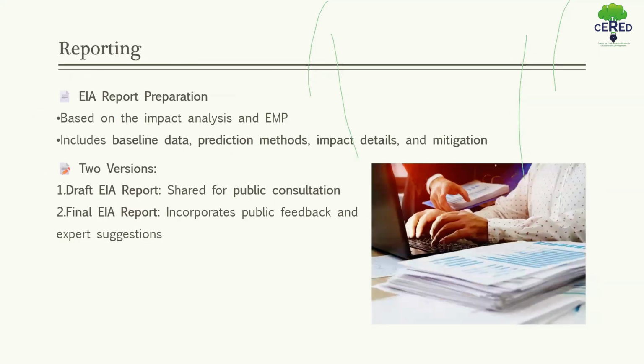The next part is reporting. After mitigation, the EIA report consolidates the findings. First, a draft is prepared for public consultation. Based on the feedback, a final version is submitted, incorporating suggestions and expert reviews.